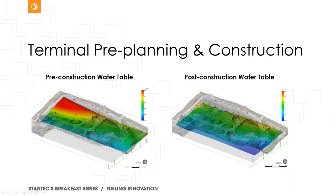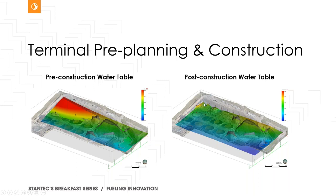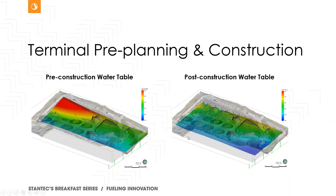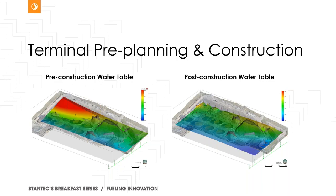So this, as I mentioned, introducing this example, there was groundwater interference issues. So as they advanced the grading, the site grading, and developed the retaining wall, those sand seams and, to some extent, coal seams within the bedrock unit that were permeable, fractured and permeable, were dumping a lot more water or groundwater aggression was coming through the retaining wall and making very difficult conditions, obviously in this red area where it was very wet and they were having water management issues. So this 3D CSM was really facilitated by the fact they were having these issues and they didn't know what to do to mitigate it such that they could carry on, meet their construction deadlines, etc.